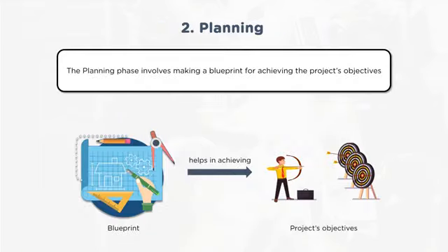Now in planning, one will understand the project in entirety. If it is a waterfall approach, one has to have a clear articulation of the entire project, comprehensive details, a holistic approach. Now if you're going in an agile way of approach, in this planning you may have a big skeleton. As you go through each iteration, you may deep dive into detailed planning if it is an agile approach.